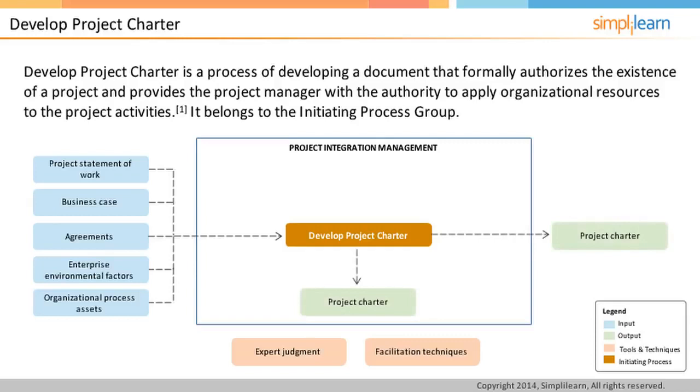Let us try to understand what the project charter might contain. The project charter usually contains the high-level project requirements, and it should be created by the project sponsor and handed over to the project manager. The project manager can do the groundwork to prepare the project charter, but it must be signed by the project sponsor or somebody in the performing organization who is higher in authority than the project manager.